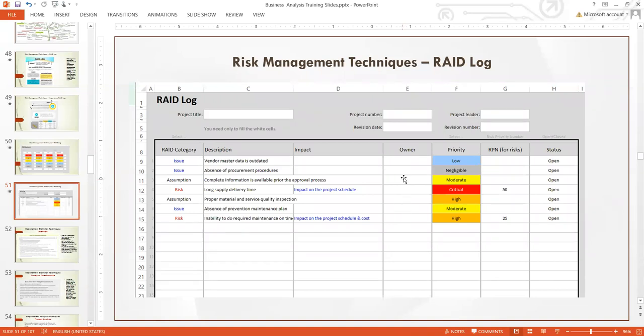So if the risk, for instance, that's why some of these software, if you're using software like ServiceNow to capture your incidents, whenever you are logging a risk or whatever, or incidents, you must give that incident a timeline. You can't just log it up and leave it. There must be a timeline.